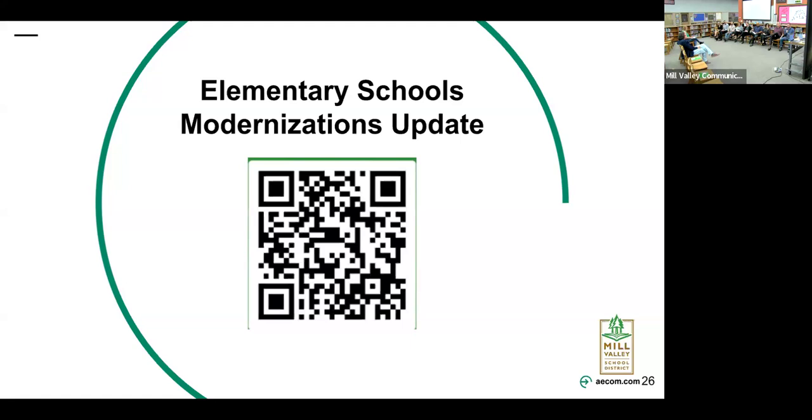upgrading and downgrading of wind, monitoring wind direction. So the equipment that's used is set to go off of audible alarms that are set through regulations. And if the alarms are set, work is stopped until mitigation measures can be put in place or it's safe to continue. So constant monitoring, and it's all determined based off of the concentrations and the results we get of the preliminary endangerment assessment. Everything is tailor-made to be site-specific and safe for any concurrent activity that could be going on along the site or the community.